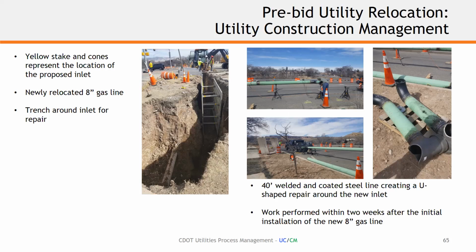Yeah, this is a good example of some of the problems we have all over the state with utilities. We have a utility drawing design that's based on their plans and their schematic, and it rarely ever includes our roadway improvements. So we have to take their drawings and drop them in somehow into our drawings and make sure that it fits the alignment that we're looking for.